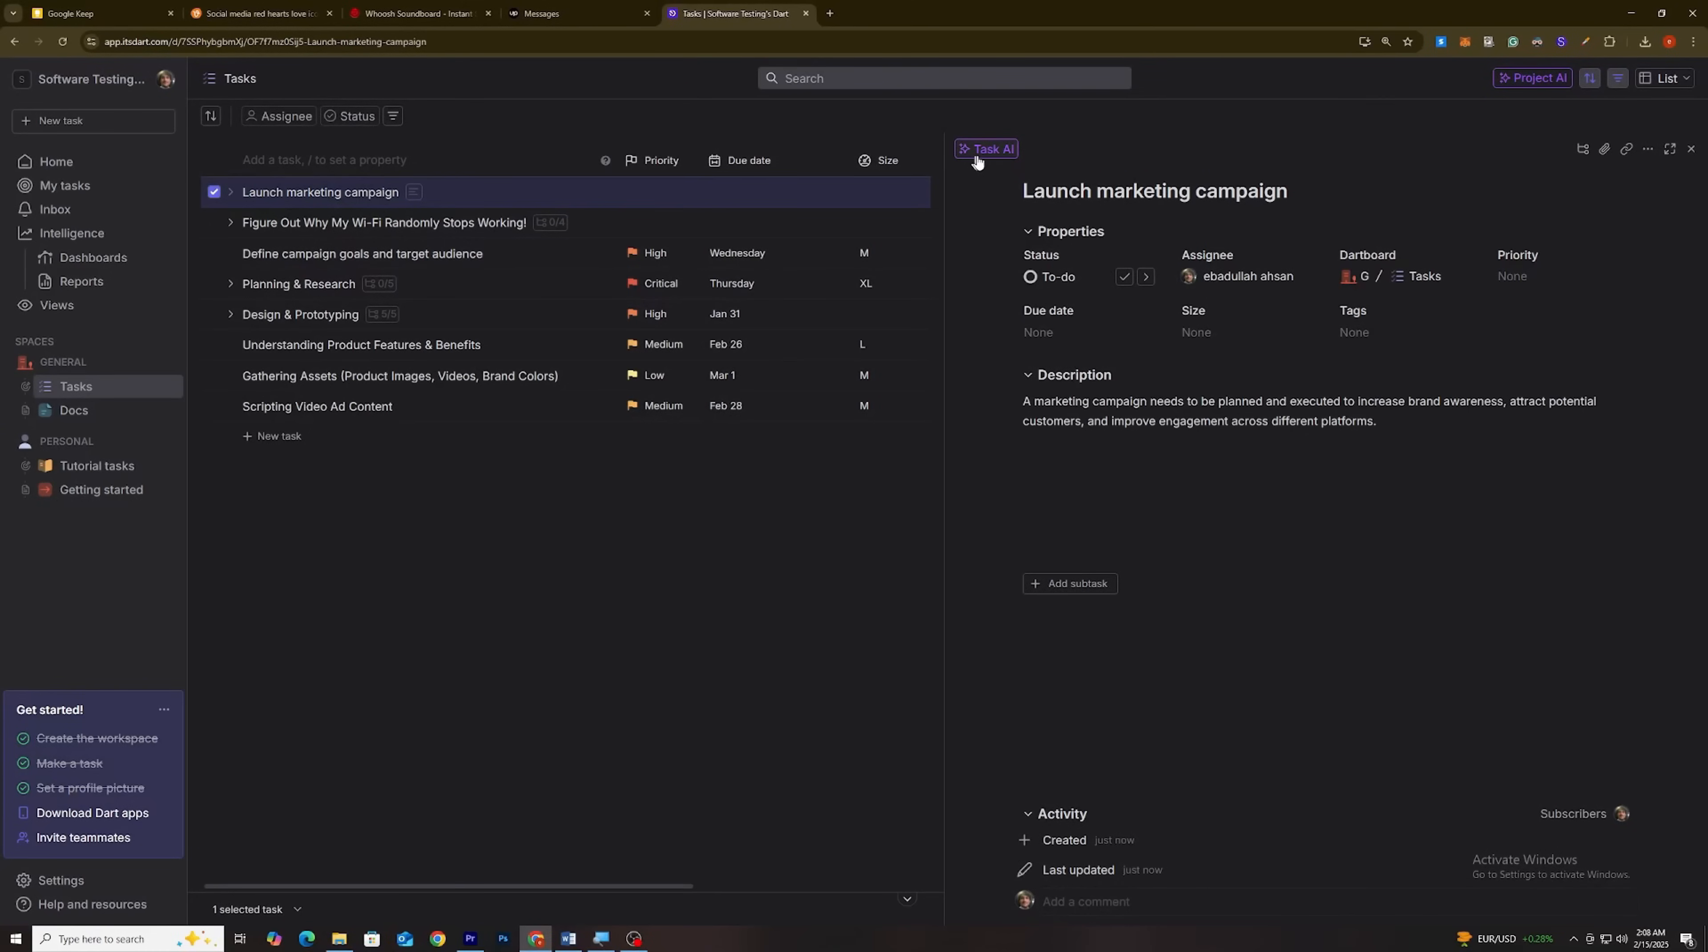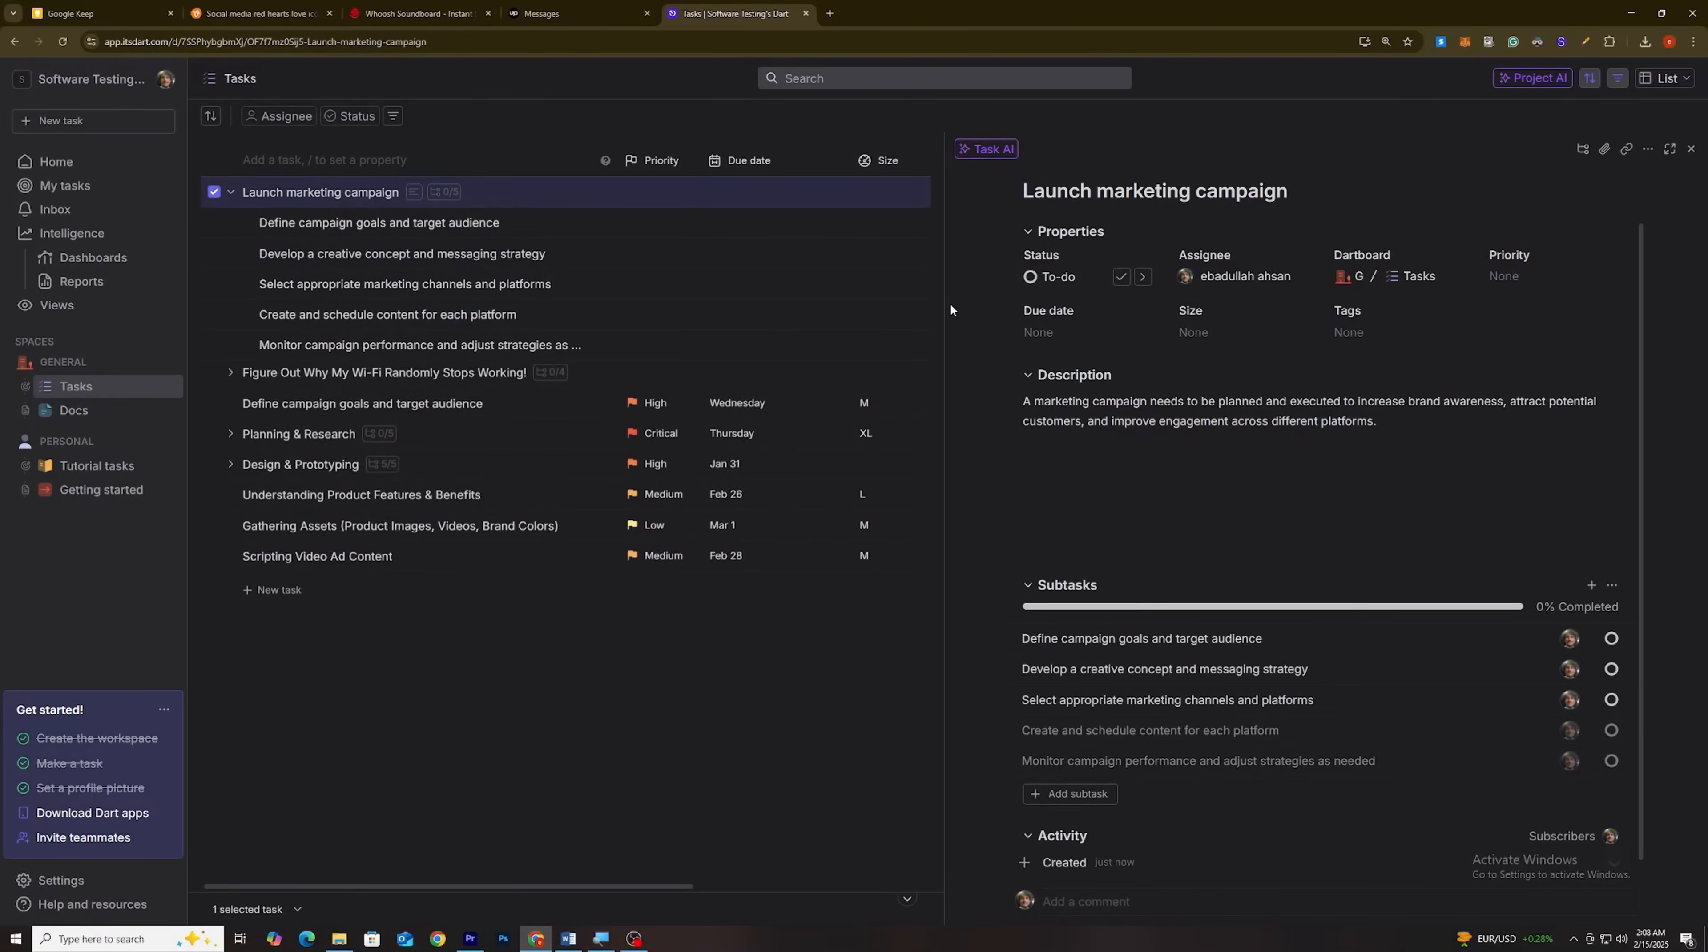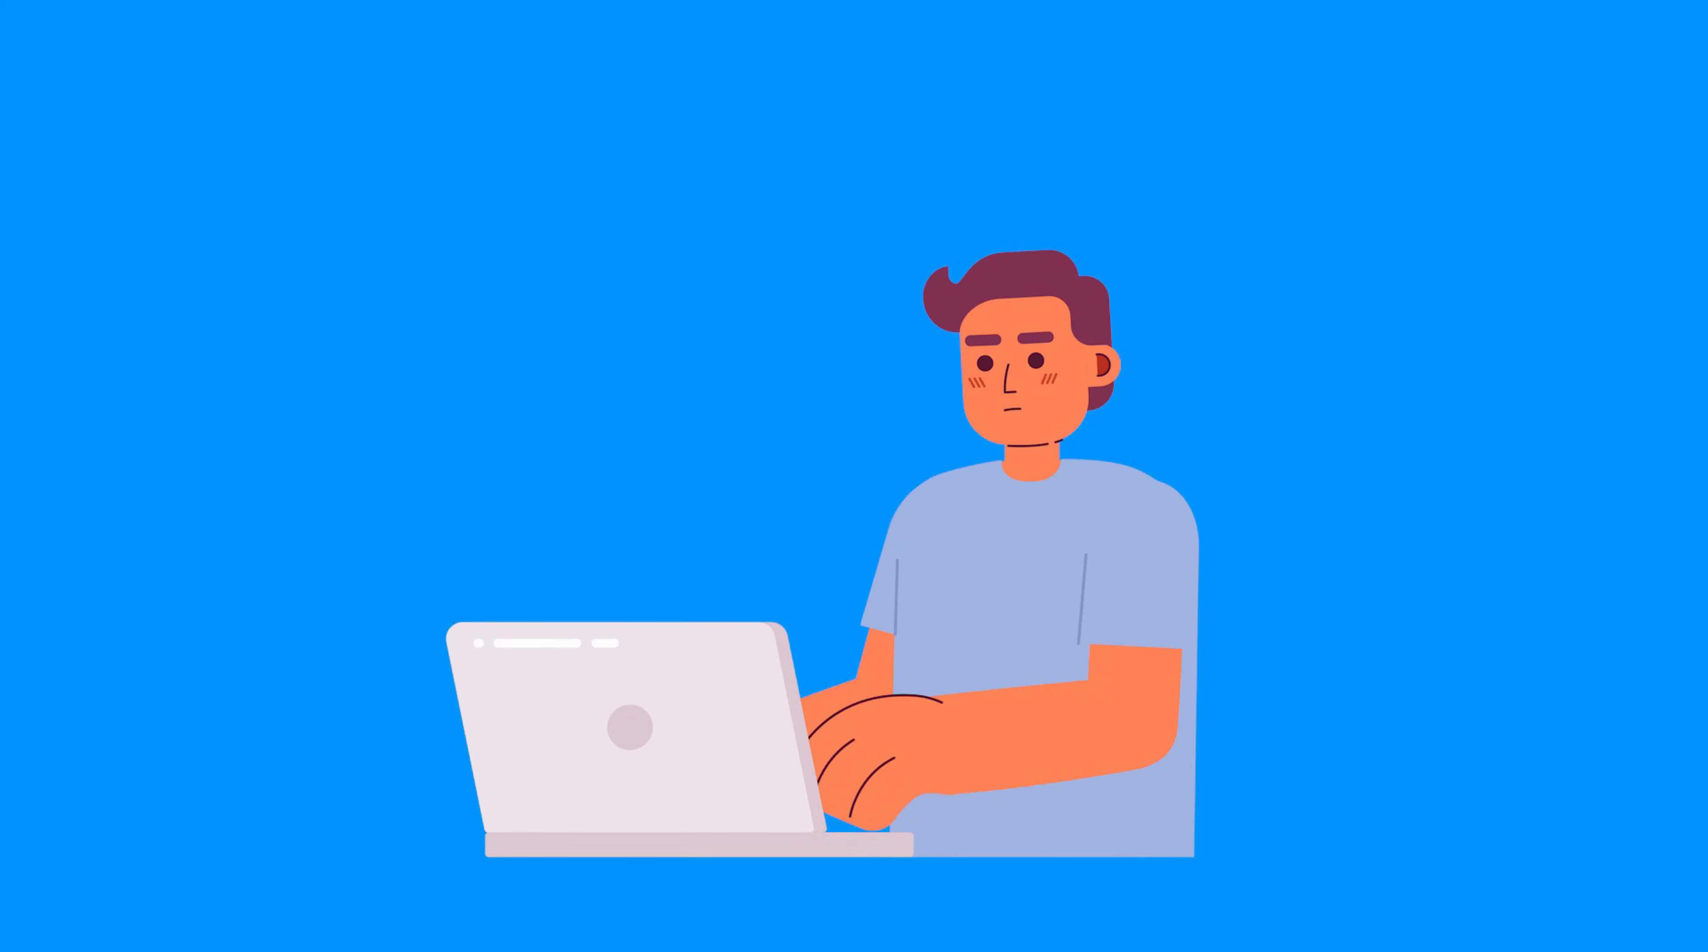Hit Task AI, then break into subtasks. And boom, your massive project is broken down into clear, manageable steps. No more sitting there, racking your brain for what to do next.